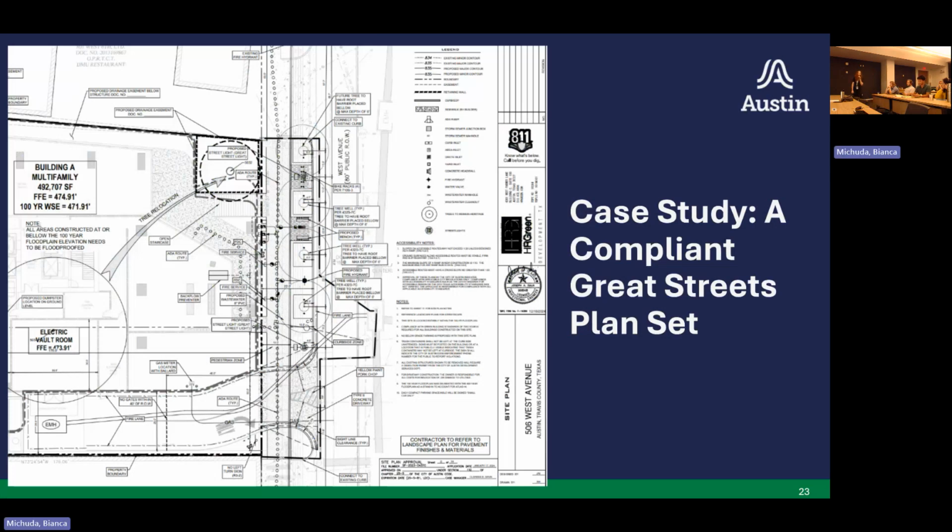That's a great question. For the relationship between Great Streets site plan review and license agreement, from our perspective it's exactly the same for urban design. Ideally, I understand this is not how it works, you would submit your site plan and your license agreement around the same time. My understanding is the license agreement process takes up to 9 months or more, because as you update the site plan for Great Streets, you have to make the same changes to the license agreement because they need to match.